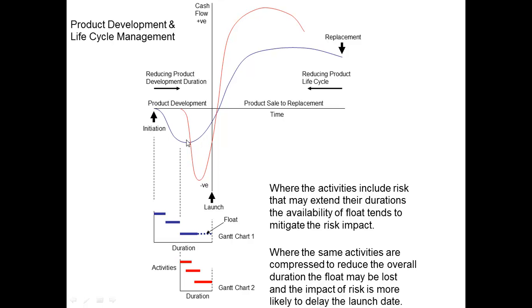It's another interesting phenomenon that if we were talking about company A and that the rate of spend was as the blue line, then we might need 100 people, let's say, involved in that process. If the rate of spend is much quicker, then we might need 200 people at the peak. Now, most companies aren't going to double the number of staff that they have. So one of the implications has been that a lot of this speeding up needs to make use of virtual capacity through the supply chain.